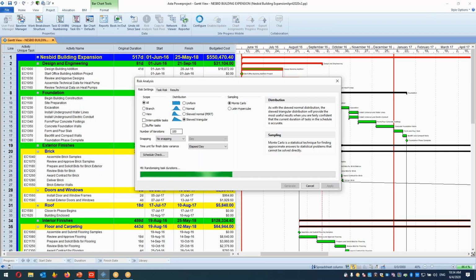Let's say I have two activities, A and B, both 10. Activity A in one version can be 11, and activity B in the same version can be 7. It's not automatically increasing all of them or decreasing all of them. It's just randomly increasing and decreasing, each individually and separately.